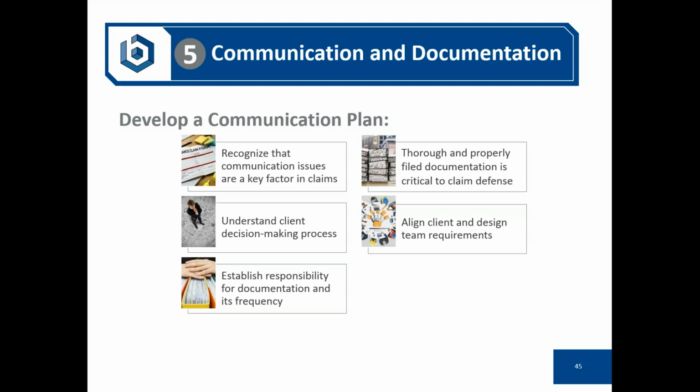So you want to establish responsibility for documentation and its frequency. This is a project management responsibility, but the project manager can assign this to another member of the project team. What's important is that every meeting that you have with a client be documented as far as key issues, decisions made, follow-up steps, and the like. And that it be issued to the participants.